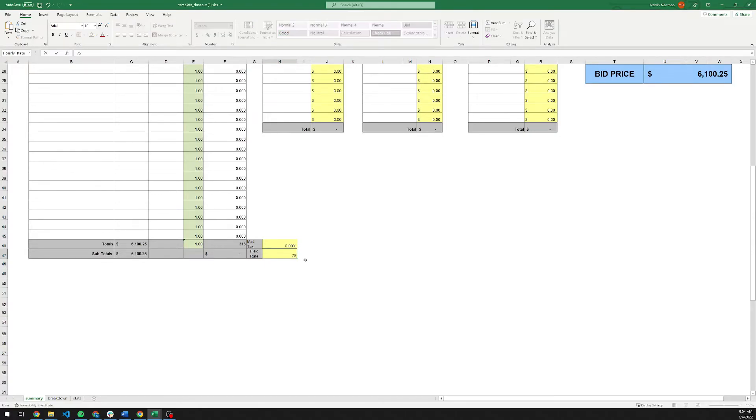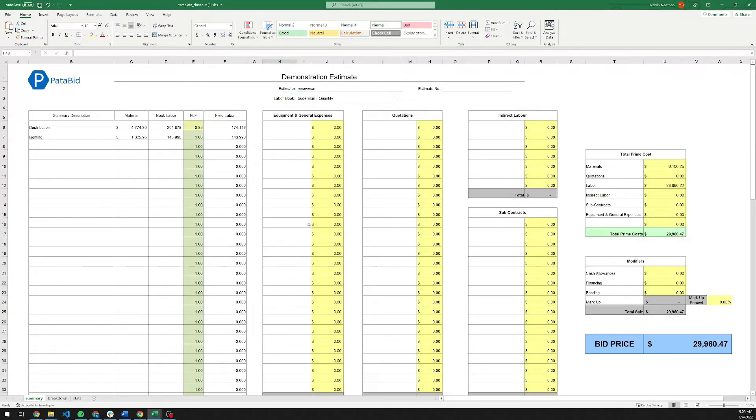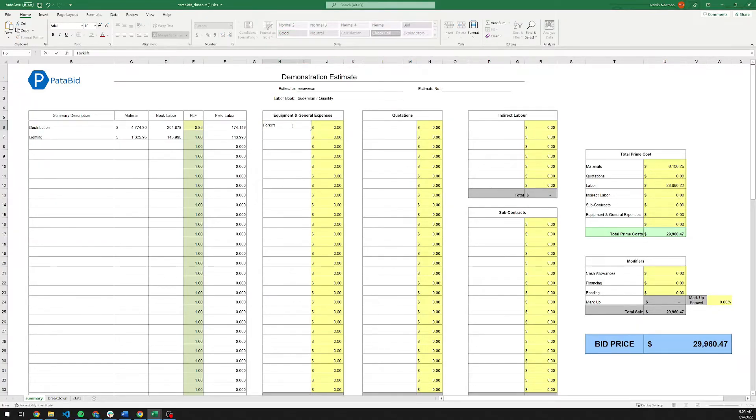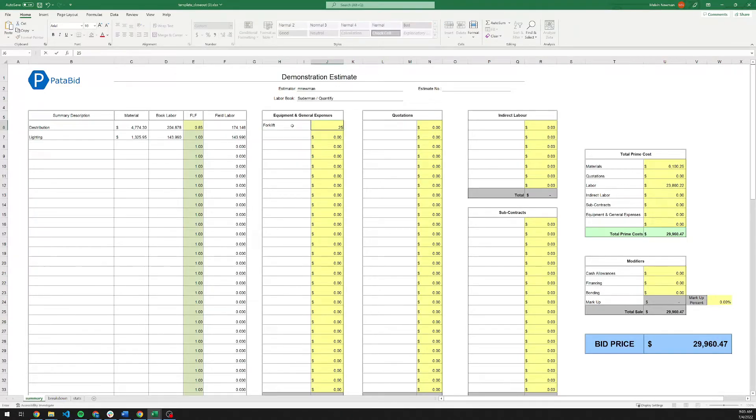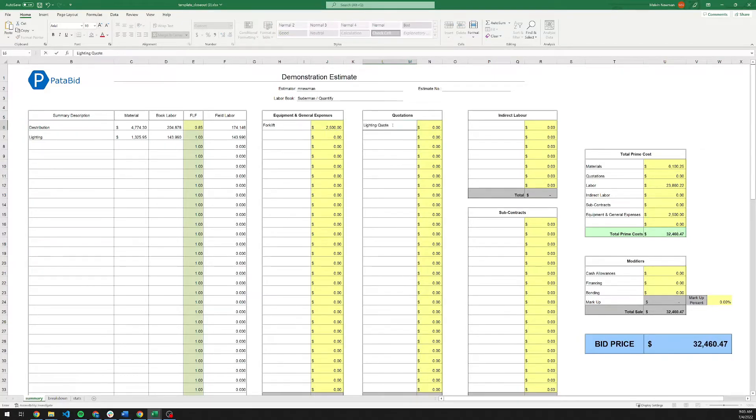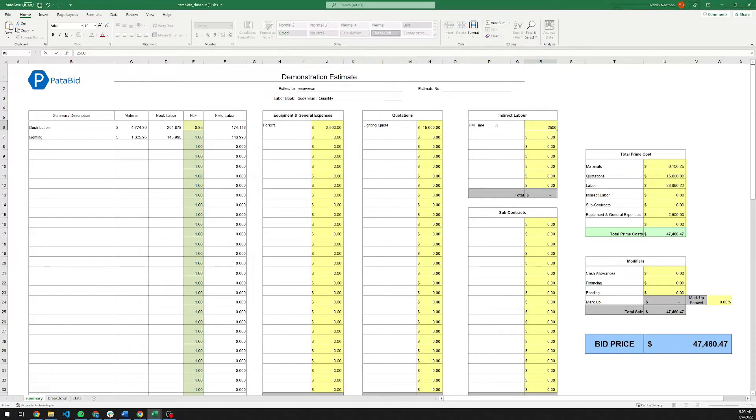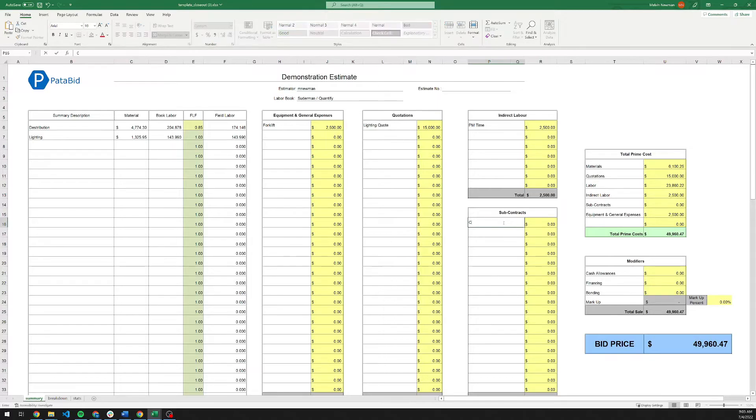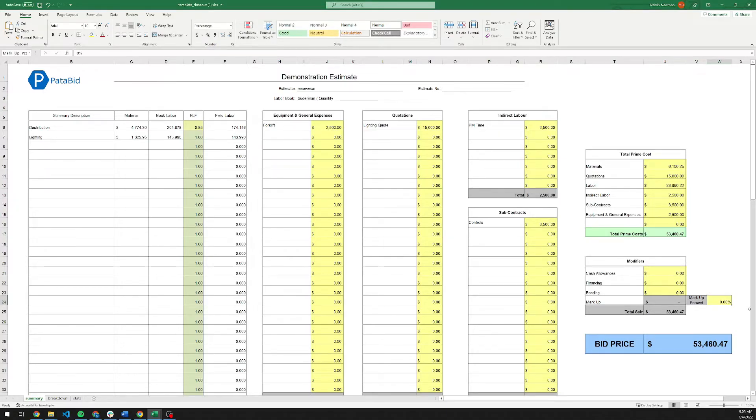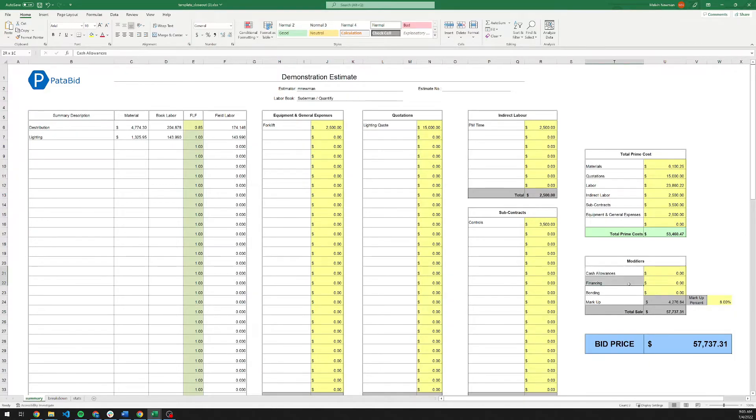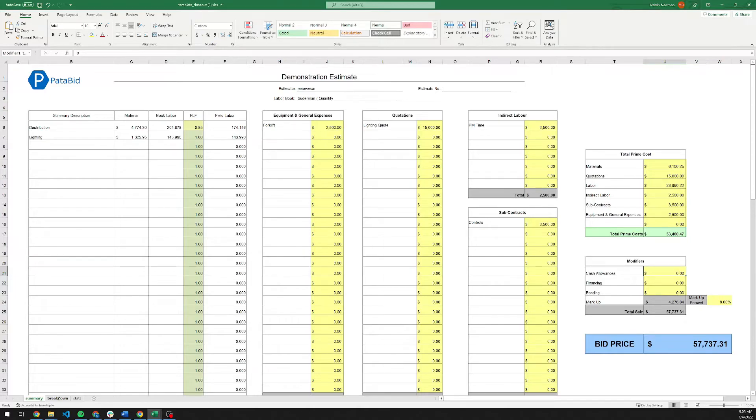Down here, you can enter in your labor rate. You can enter in any material taxes. We can go ahead and enter in any sort of equipment and general expenses here. Forklift, for example. We're going to make that $2,500. We've got our lighting quote. Maybe some PM time for this project. A controls subcontractor. Then we can select our markup that we want to apply to it. There are a couple of modifiers in here. Cash allowances, bonding, financing, etc. These are just straight numbers. There are no markups applied to them.